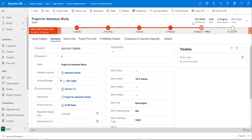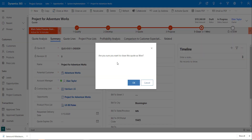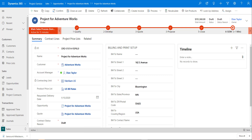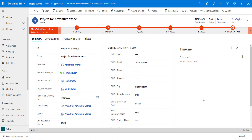From here you can activate your quote, create a PDF, or email it as a PDF. When the customer says yes, you can close that quote as Won. Since I closed it as Won, it has now created the order — which in Project Service is actually a Project Contract. From here we can start assigning people to the project. Once team members log and submit their time, and time is approved and marked as ready to bill, we can create invoices directly from the project contract.